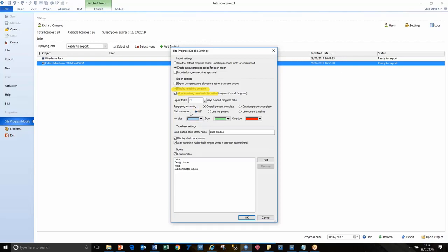You don't have to give people clues to the status of the activities that you're presenting them, but I like to do that. So I'm going to use information from the live project. So if we should have done it by the date I'm talking about, it's going to go red. If we should be working on it at the date that I'm saying, in this case the 30th of July, it's going to be that color of green. And it's going to be this color of sort of greeny blue if it's ahead of the end of the period that I'm talking about.